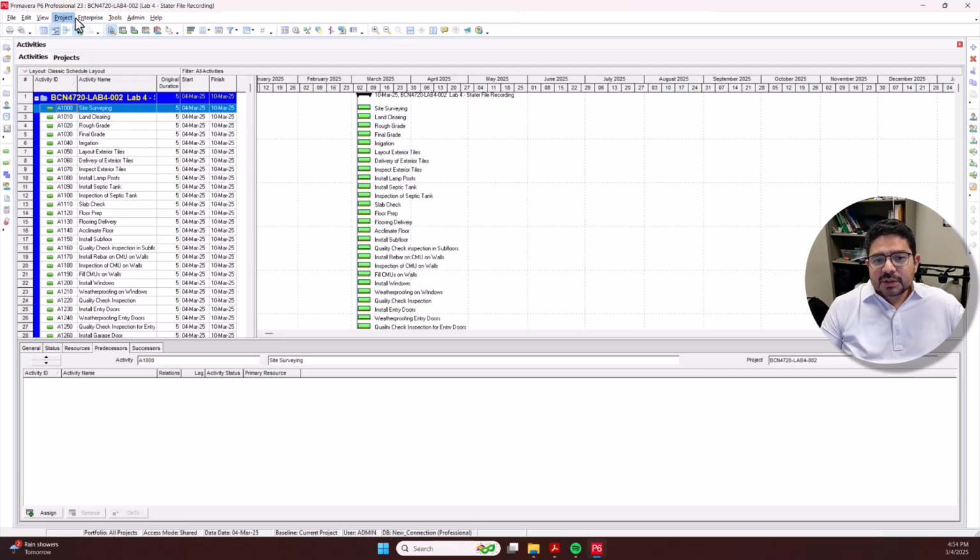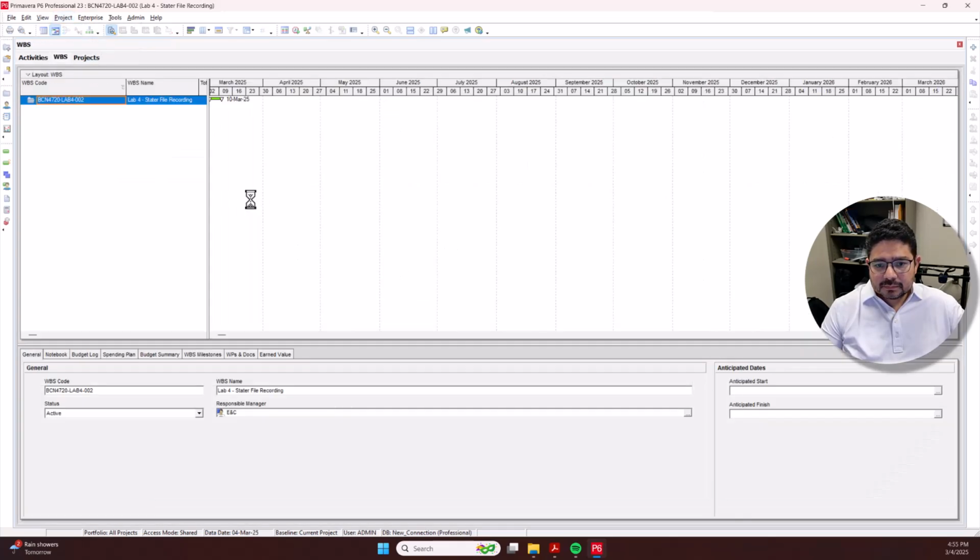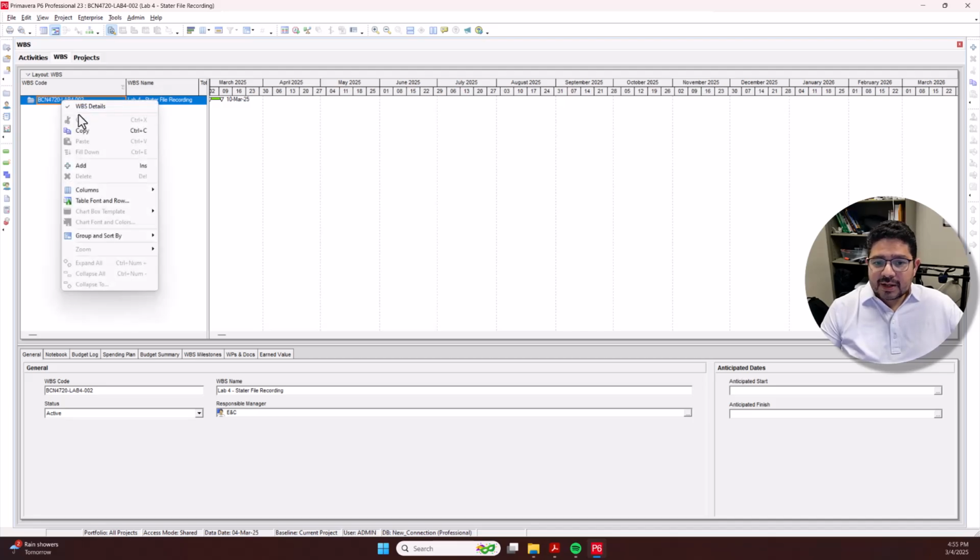In Primavera, there is a specific tool to be able to develop the WBS. So we're gonna go to that by going to Project and then WBS. All right. Currently, the WBS is empty, obviously. And right now, just to show you how this works, I'm just gonna add the 5 items at level 1 that are on the Excel file. The way that this works, same as we do for the activities, is you just right click to add a new item.